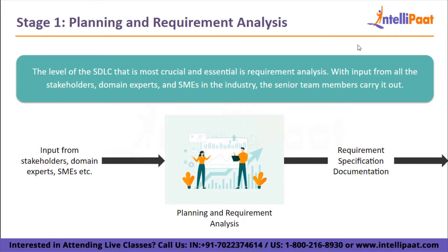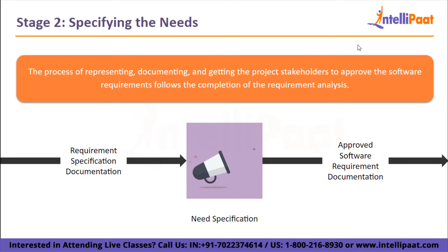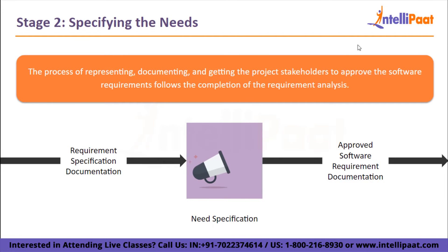Next, we have specifying the needs. The process of representing, documenting, and getting project stakeholders to approve the software requirements follows the completion of the requirement analysis. This is done using the SRS document, which contains all the product requirements that must be created and developed during the project lifecycle.